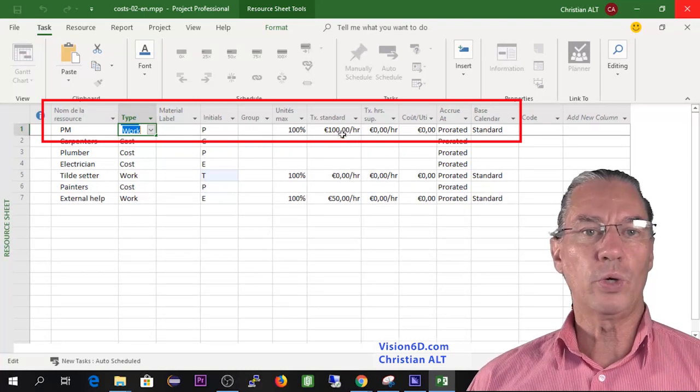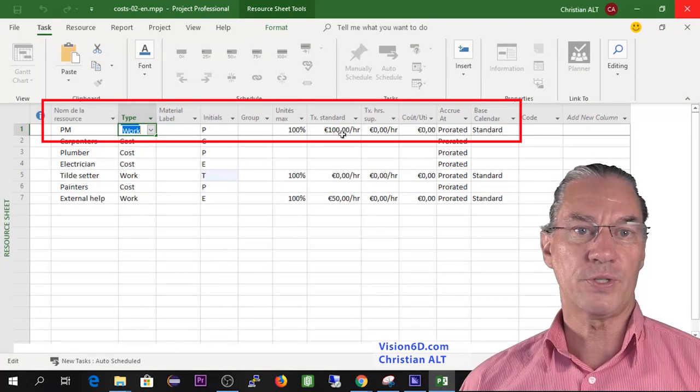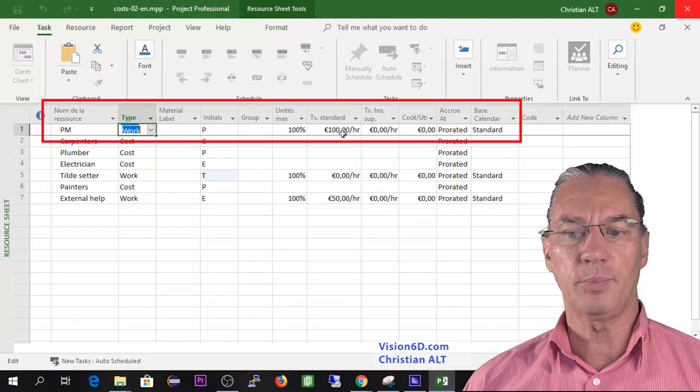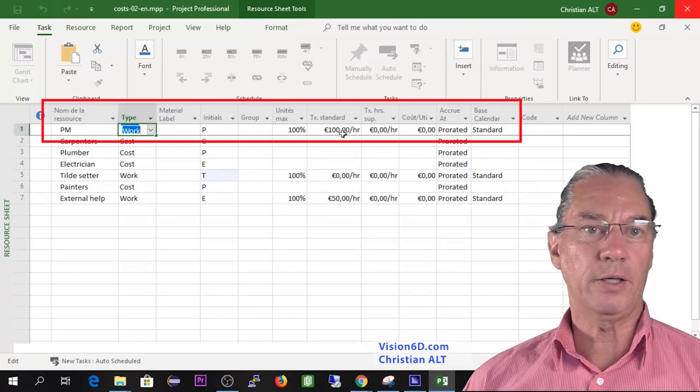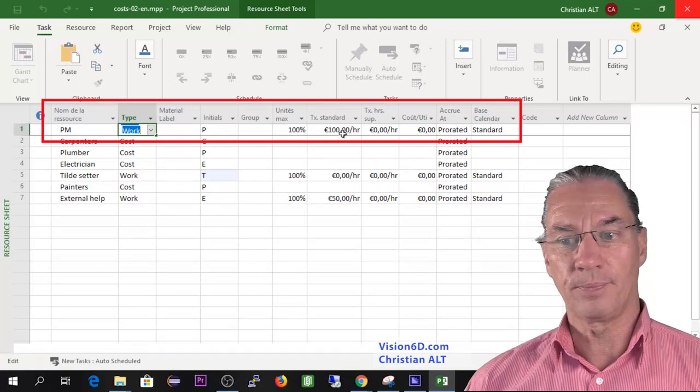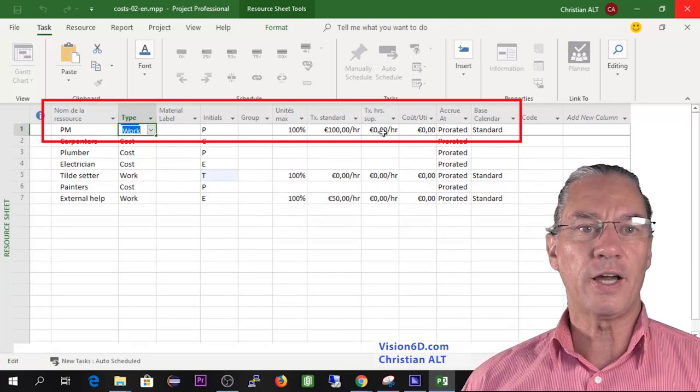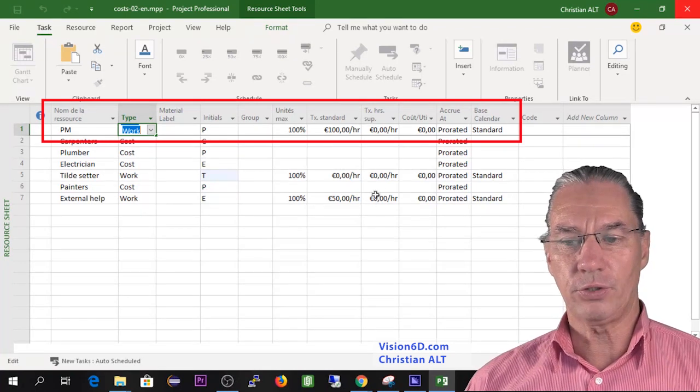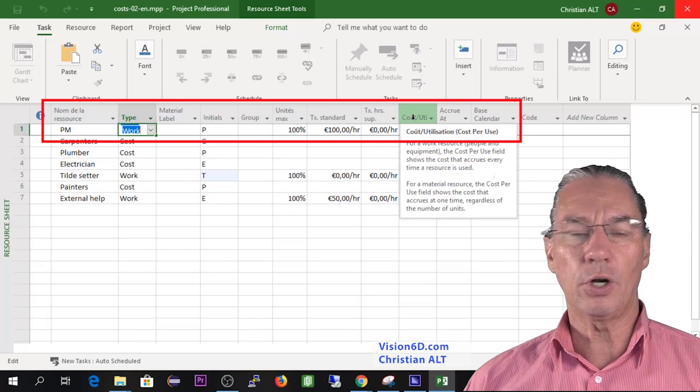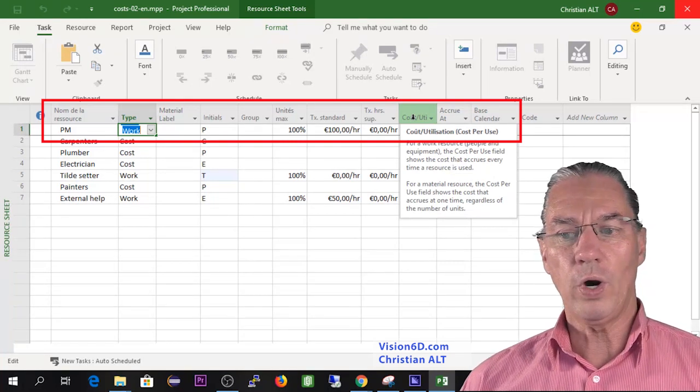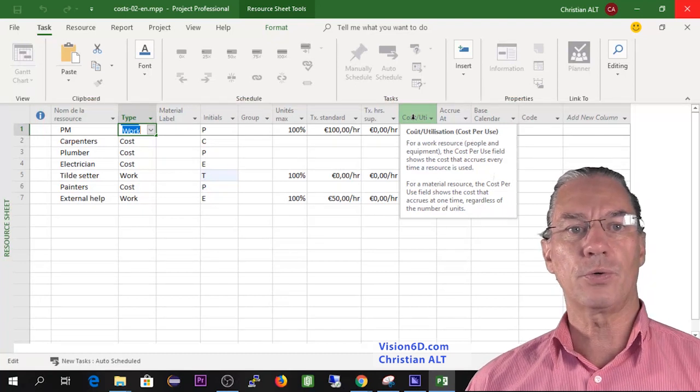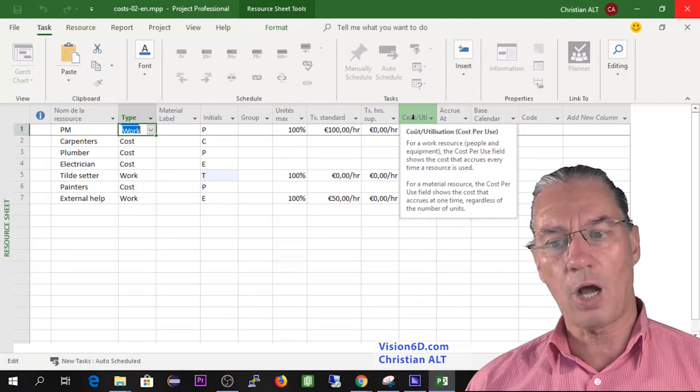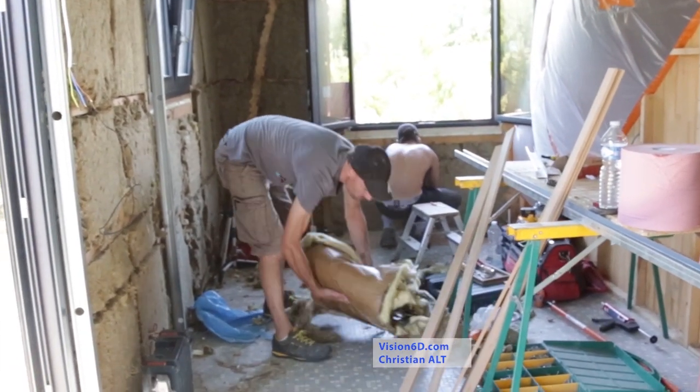As a work resource, what is important is the hour rate on which I'm going to work. I've put here 100 euros per hour. What will come out is there will be a calculation between the hours spent in the project multiplied by the hour rate, which will make the costs to the project. I'm not going to use overtime hours here. We have here a column for certain resources where there is an additional cost, a first-time cost. I'll come back to this later.